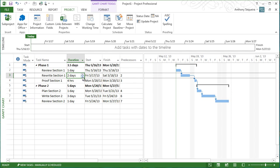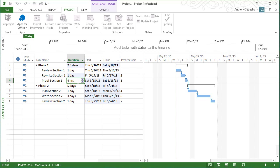I look at this and I realize, you know what, I can do the rewrite of section one in just one day and Microsoft Project will adjust everything for us. And, in fact, we're going to finish now with a few hours to spare on Friday, the 24th. In fact,